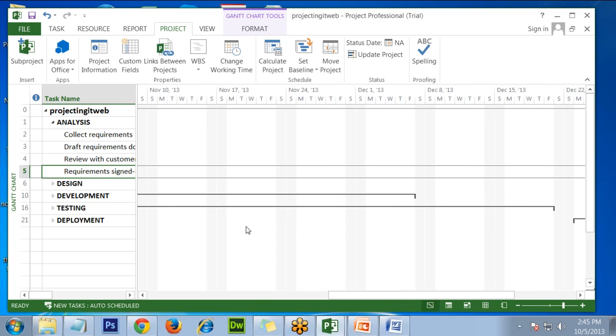Critical path is any path that decides the duration of your project. There could be multiple tasks on your project. Each task will have a duration. Tasks will have dependencies. The dependencies, tasks and their durations decide which path will decide the project duration.